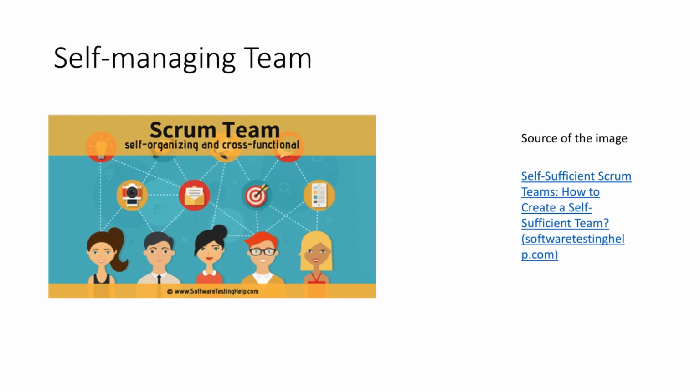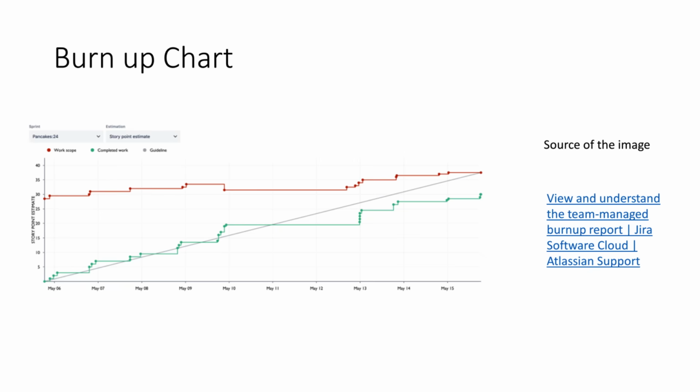Burn-down chart. Burn-down chart is a chart which shows the amount of work which is thought to remain in a backlog. Time is shown on the horizontal axis and work remaining on the vertical axis. As time progresses and items are drawn from the backlog and completed, a plot line showing work remaining may be expected to fall. The amount of work may be assessed in any of several ways, such as user story points or task hours. Work remaining in sprint backlogs and product backlogs may be communicated by means of a burn-down chart.